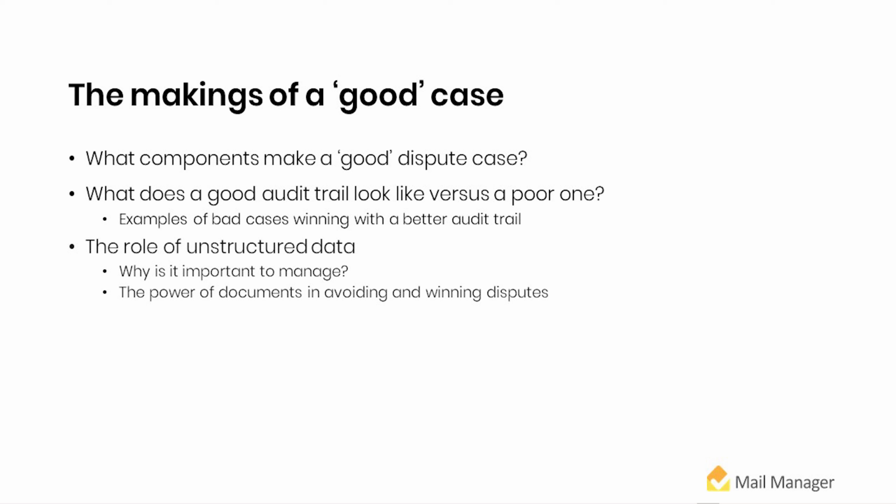If you haven't managed the documents, if you haven't set the documents up properly so they're being recorded, tracked, using the right keywords, you actually create an enormous problem for yourself later on. And I think, as we go forwards, that's where you'll see a lot of your lawyer cost being spent. It's all around trying to track down the documents. Not that they don't exist, they do exist. It's just you can't find them anymore.